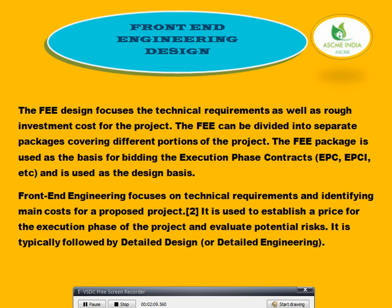The FEED can be divided into separate packages covering the different properties of the project. The FEED package is used as the basis for the bid. The FEED is the engineering basis, and EPC/EPIC contracts use it as the design basis.